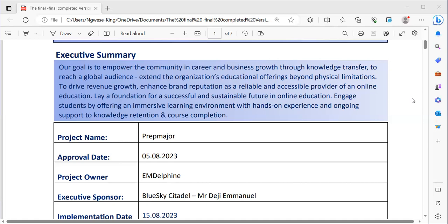So now, let's assume that they've done it thus far wrongly. I will tell you from Monday, their focus, their goal on Monday is payment. You already know beforehand that this is their goal that they need to work on, payment. Now you need to be telling them, for instance, the BAs need to start writing requirements for payment. If they have not done it before maybe Thursday or Friday, then they are already set up to fail. Do you get it now? So you need to start talking to them, not talking to the BA directly. Do you get it now?